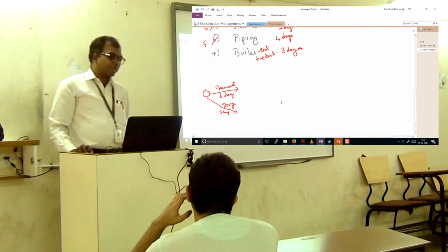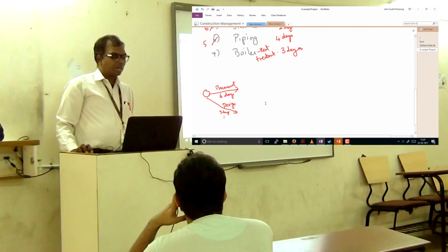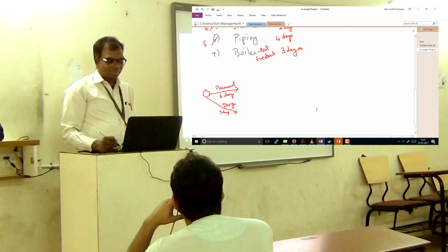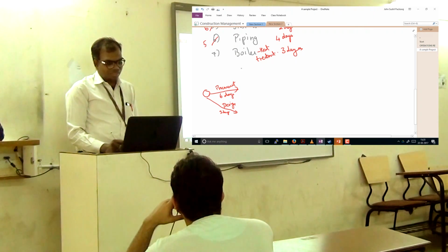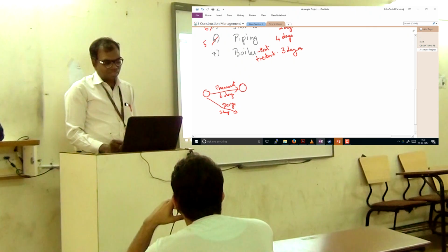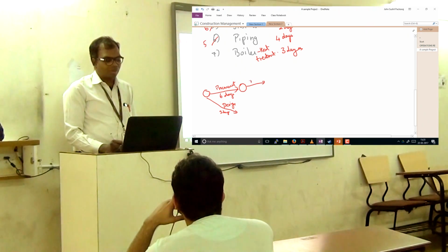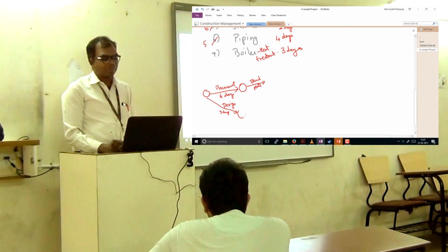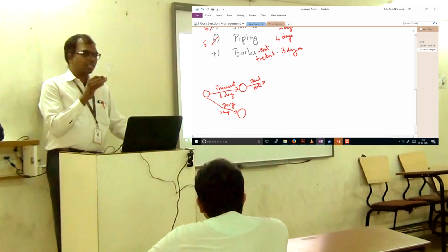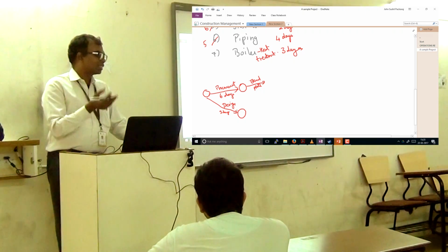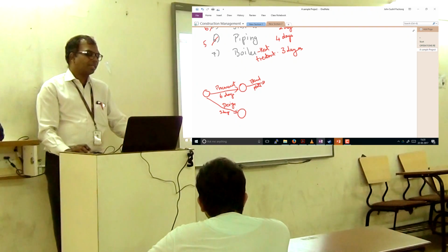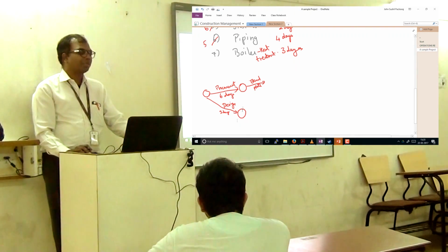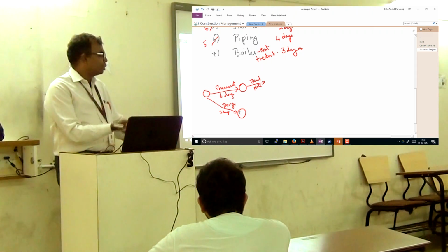Now, where will bend the plate come? After procurement. Okay, I just cannot start this before I finish procurement. Now there is a slight problem. I need also to design the various parameters before I start to bend the plate. But then there is no activity between these two that joins them, right? There is nothing which I can think of as an activity to join them.